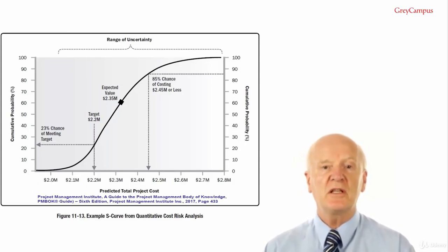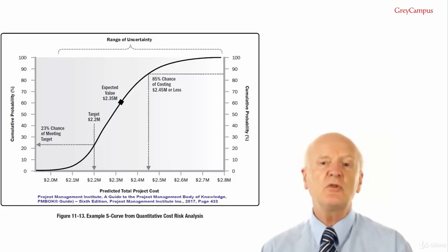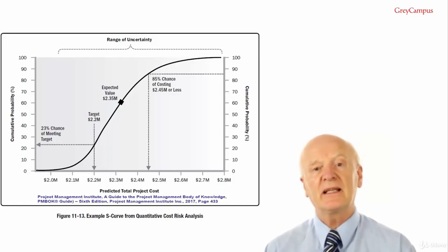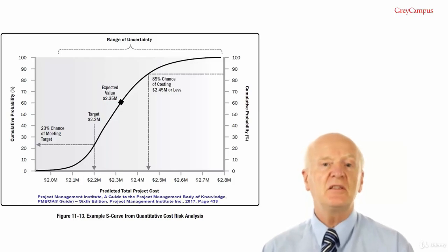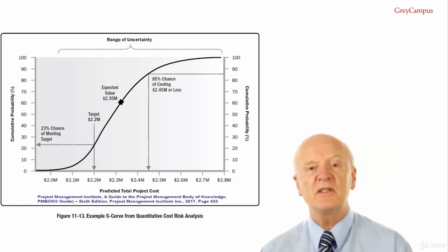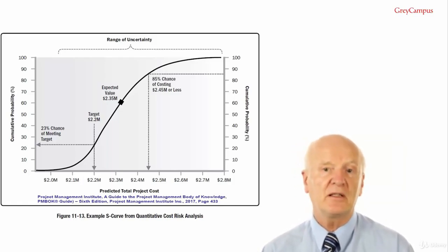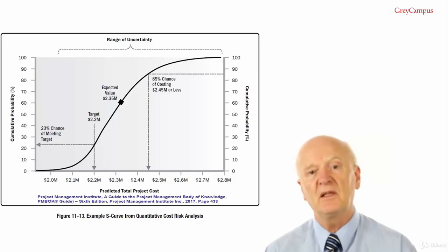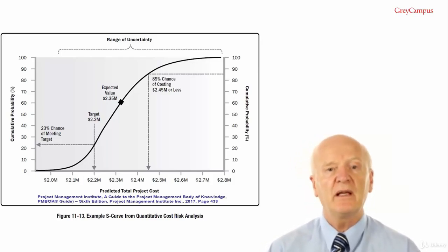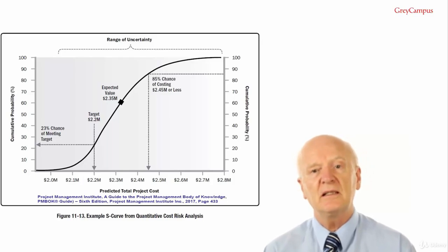For a quantitative schedule risk analysis, it's also possible to conduct a criticality analysis that determines which elements of the risk model have the greatest effect on the project critical path. The risks are displayed with the percentage likely impact. Also a sensitivity analysis. You can also perform sensitivity analysis by considering each risk in isolation.